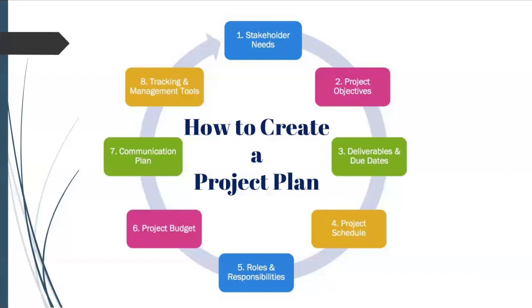Let's say you have a project in which you have two software developers, $250 per day each. You have two software testers, $250 per day each, so 500 for software developers and 500 for software testers. One business consultant for 500. So again, it is 1,500. And then you have a project manager for 500, so 2,000. Plus you have a team lead, which is again 500. So 2,500. Again, let's say you have two support engineers at 250 each. So it becomes almost 3,000. So $3,000 per day is the price of executing the project for a single day.